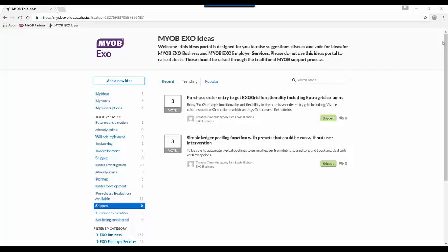Just on that point, the use of the quote budget tab, even if you don't transfer those lines through to the cost tab, is really significant in the analysis tab. So you go in and you've got the widgets that produce the graphs and everything like that. That's where you're going to, by default, get the best overview of that information in a comparative sense. It's going to give you a bar graph that's got lines for what you quoted, it's got lines for your actuals, and it's got lines for your invoice as well.